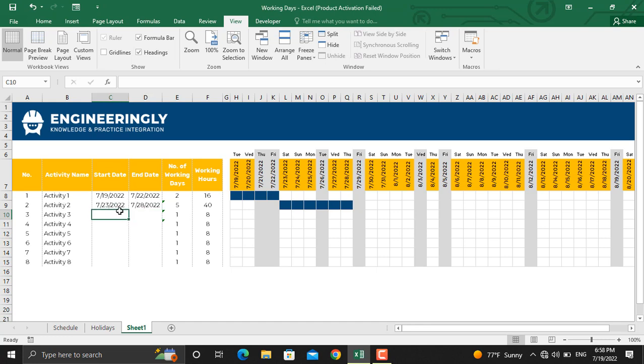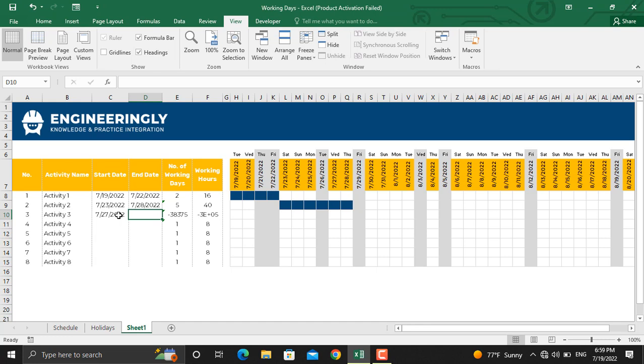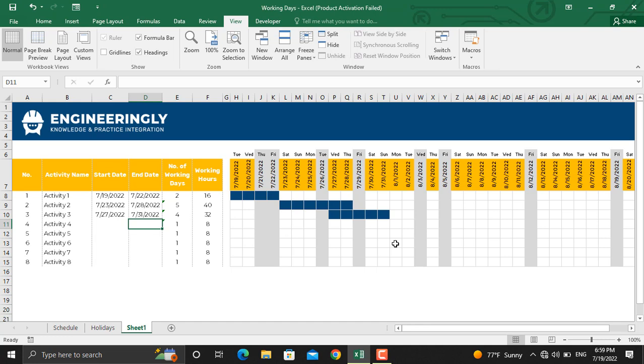We can carry on doing the same for other activities as well. For this activity, the start date could be one day before this activity ends, so I'll write down equals sign, this date minus one day. And the end date for this activity is 31st of July, so I'll write down 7/31/2022.